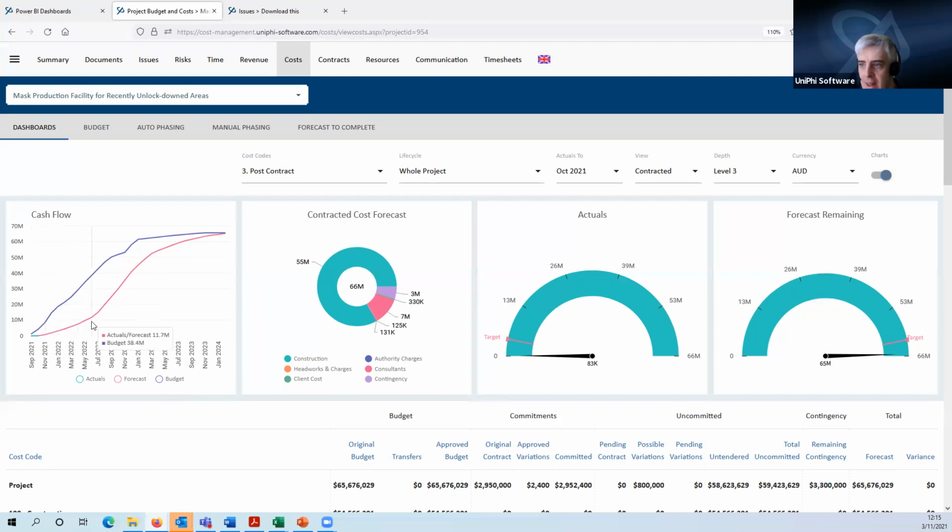We're not actually spending that until May. The whole thing is really running several months behind based on the cash flow. It's going to take much longer for things to ramp up. Once they do ramp up, yep, the speed of construction is going to be about what we thought it would be. It's just going to take longer to get there.